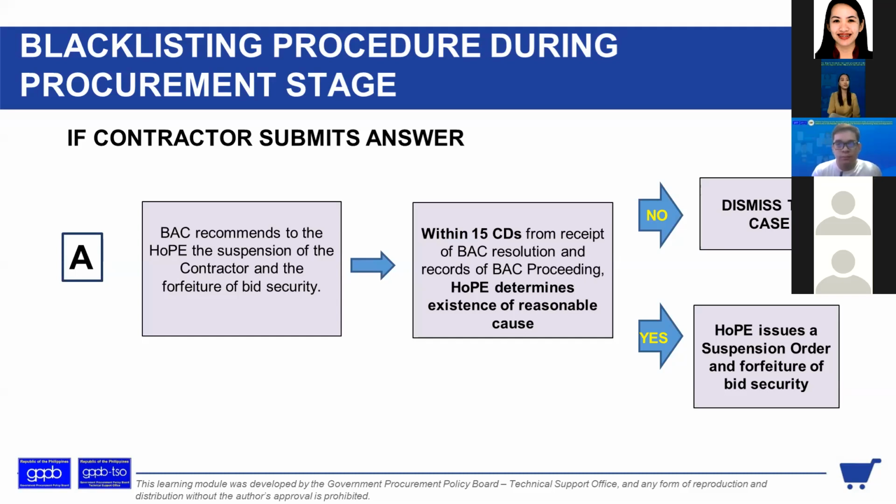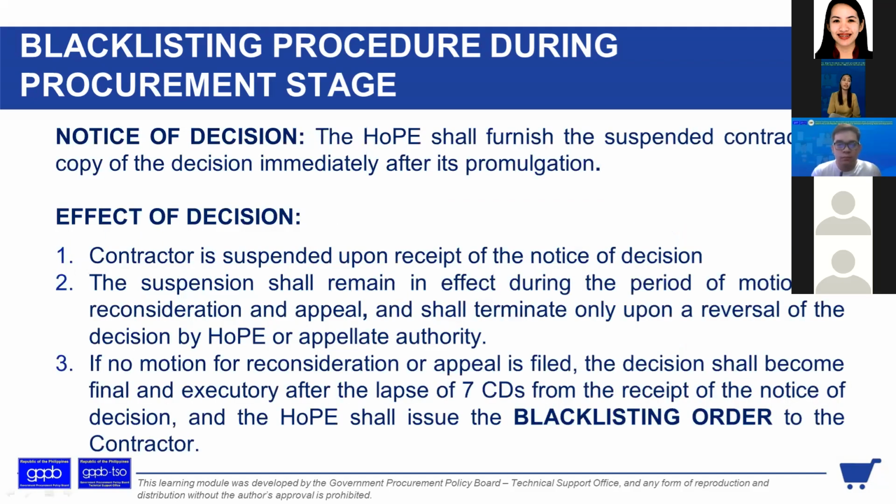No? So, notice of decision. The HOPE shall furnish the suspended contractor a copy of the decision immediately after its promulgation. So the effect is masuspend yung contractor upon receipt of the notice of decision. Immediate na, hindi na kailangan ng 7 days. So the suspension shall remain in effect during the period of motion for reconsideration and appeal.